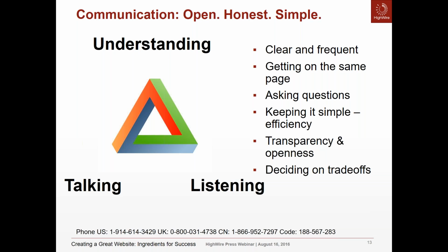It depends on the amount of customizations, et cetera. Sometimes more touch points, and I mentioned this earlier, are more helpful. Some publishers feel more comfortable with a daily stand-up. They just want to know where we're at and if there's anything that needs to be addressed for that particular day or time. And I think that can be really helpful. For this project, we communicated once a week, and then we had a lot of emails, and we were very, very flexible and open in communication. It went really well. We kept us on our task and schedule and kept things moving forward to address anything that potentially was open.